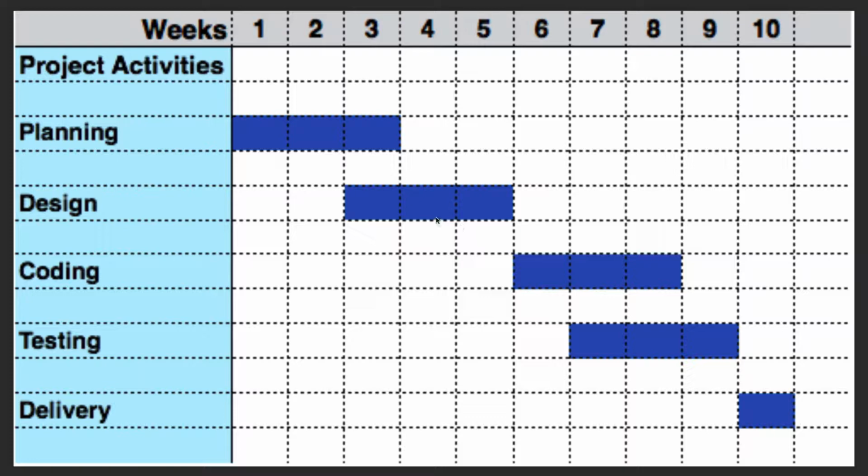Now, to do effort estimation, as I alluded to, this isn't enough. Instead of filling out a Gantt chart like this, we need to put values here. Instead of an assumed one or all or 100%, we need to put values. Especially, imagine a 100-person organization. You don't have all 100 people assigned to planning and all 100 people later assigned to design. You might have your really strong planning people assigned to that project, and then they are assigned to planning other projects. So we would put an estimate here.